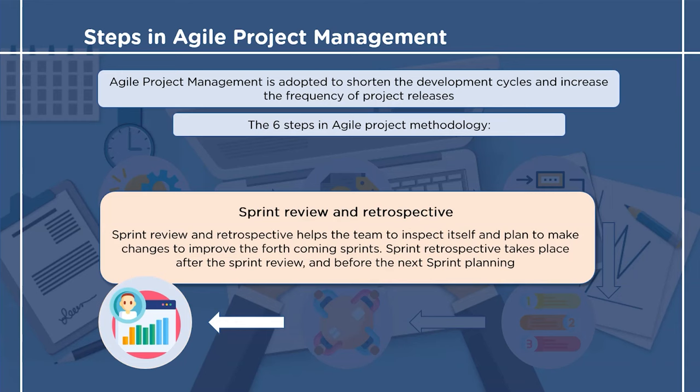The last step is the step of sprint review and retrospective. There are two meetings after each sprint. The first meeting is the sprint review, held with the stakeholders to show them the finished product. This helps both sides to build a relationship and discuss if there are any issues in the end product.